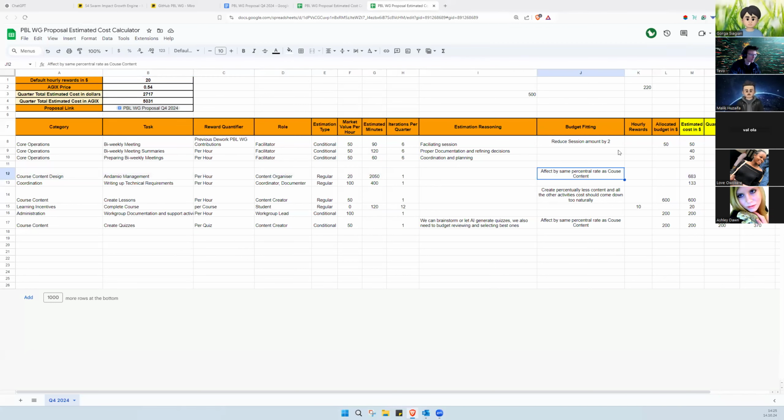So here I would reduce it by a percentual cut. Let's say if we need to reduce it by 5%, then it would take like $50 off here. Or maybe, because technically, if I said 20% needs to be reduced, it should be 20% from all of that. Okay, so let's say 20% from here would be $120.